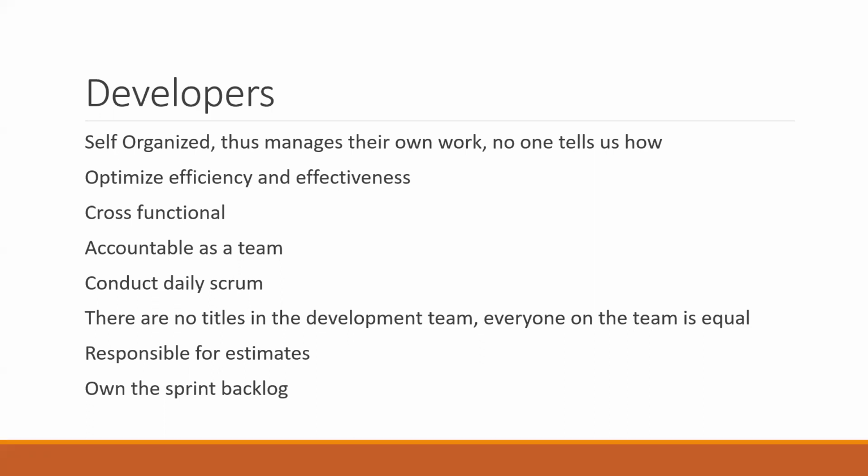And then after you've done 2 more sprints, you might be able to really estimate, based on your own sprint planning and on what you have gathered over the 3 sprints, exactly what velocity you think that team is able to work with moving on. Well, that's my own take. Maybe some other experienced Scrum Masters might have other opinions to chip in, but if I was in your shoes, that's what I'd first of all try to work with.